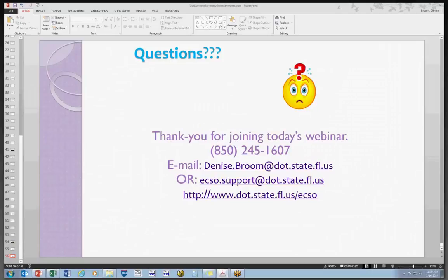The software will correctly calculate the length times width if they've used that. If you can look at it and see that they're in the right ballpark, that should be your level of checking there. Not to go back and try and verify the area ID and the quantity for each one of those area IDs.